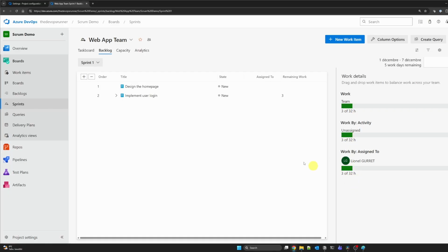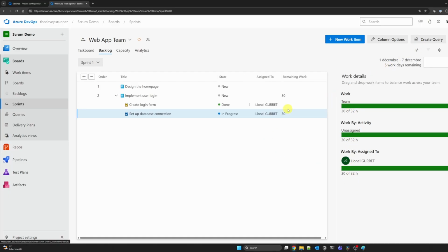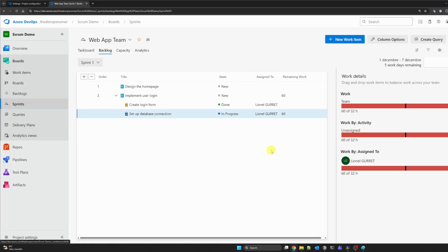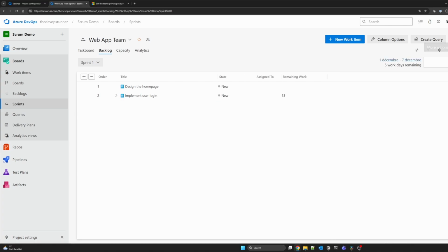When you see that red bar, you have two choices. You can either break down the task into smaller pieces, or you have to move a work item out of the sprint. This forces an honest conversation. Being realistic here is the key to actually delivering on time.